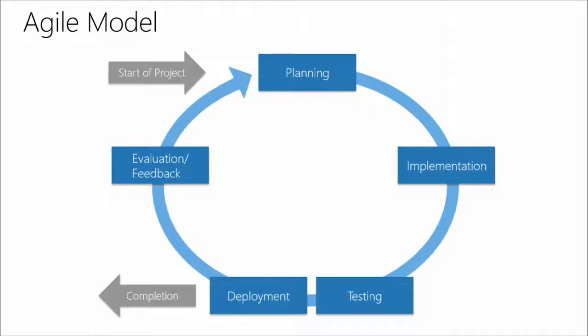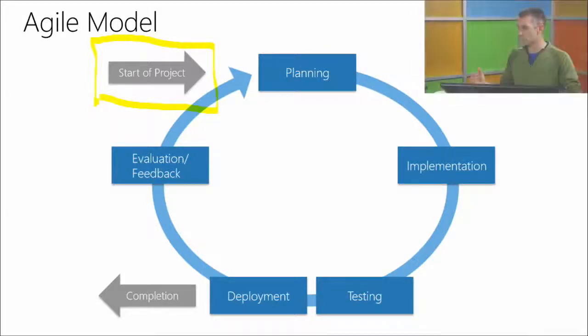So you start with your planning phase, and the first thing you do is decide on how long your sprints are going to be. Like I said, they're very quick, 2 or 3 weeks. You've got your product backlog, which has a whole bunch of items in it, and they're prioritized, stack ranked. And you're going to look at that product backlog and agree as a team.